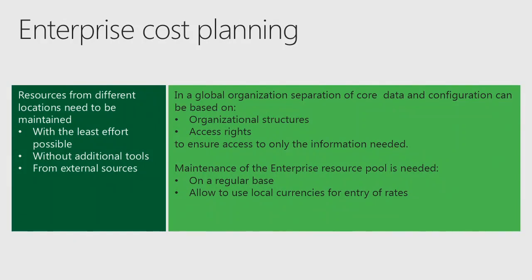So this really creates, and I've seen many cases at customers where they had a project plan going on for the whole year, the exchange rate in October went up, and my budget's gone. Not good, because I was not able to recalculate back into local currencies and to see where I'm really at in my local planning. Again, one of the challenges that we have for using Microsoft PPM on a global basis.